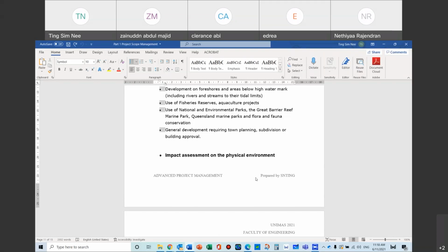So we have 2 types of studies that we need to embark on. And obviously, the other thing that you need to study is inwards through the circles: how the outer, third, second, and first layers will affect the project. Now you also have to go outwards. Outwards is like going that way: how the project will affect the company, how the project will affect the local issues, how the project will affect the third layer, the bigger level issues.